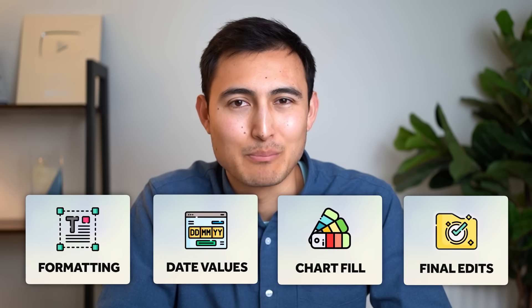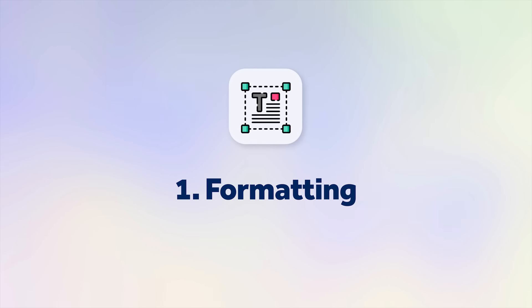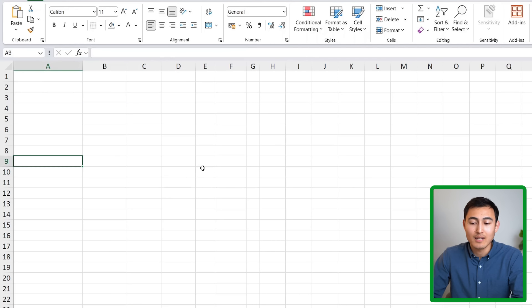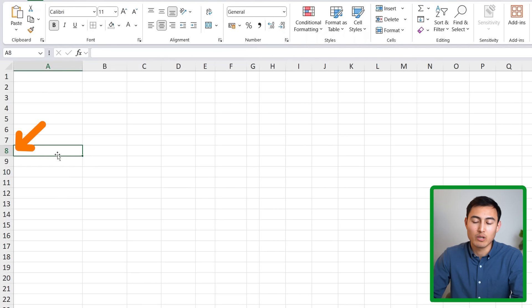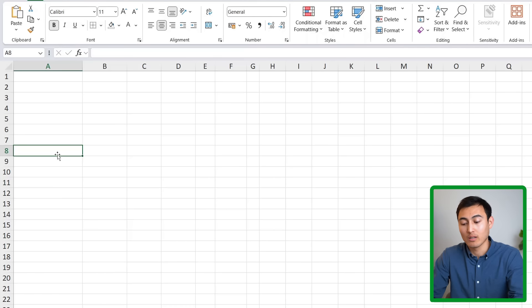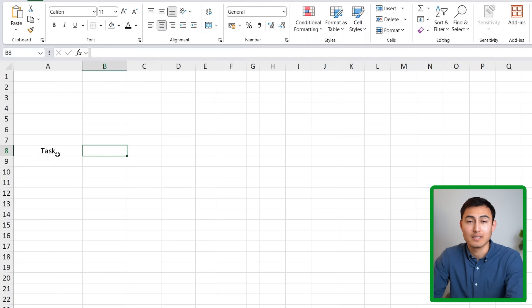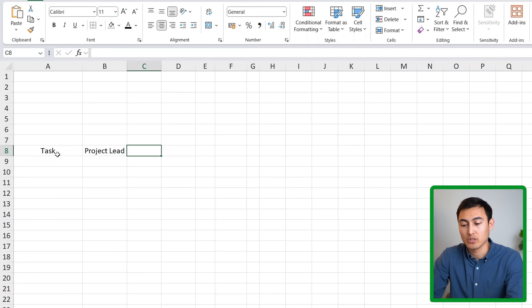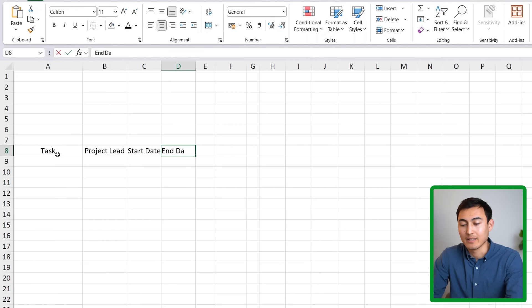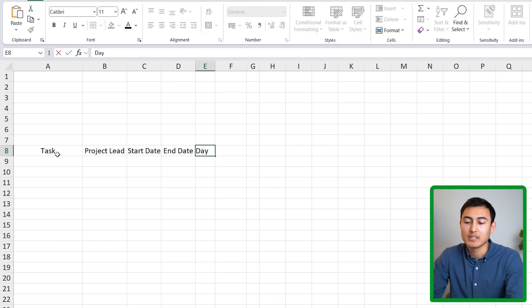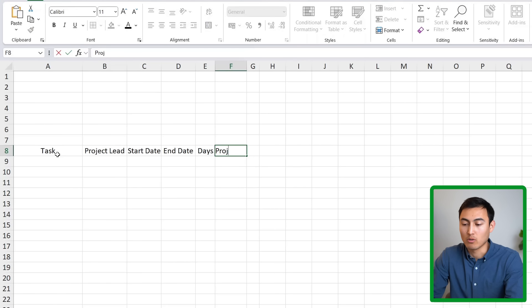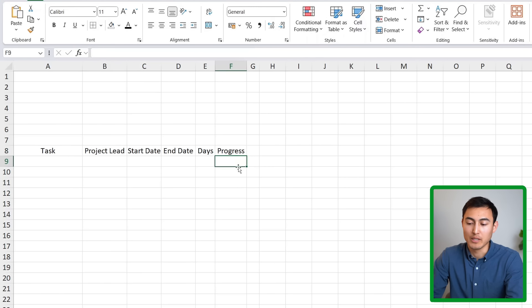In four simple steps, the first part is formatting the sheet with the right values. Starting from a completely blank Excel file around row number eight, we'll add columns for the task, the project lead — the person in charge — then the start date, the end date, and the days which is the difference between the two, and finally a progress column for percentage completion.